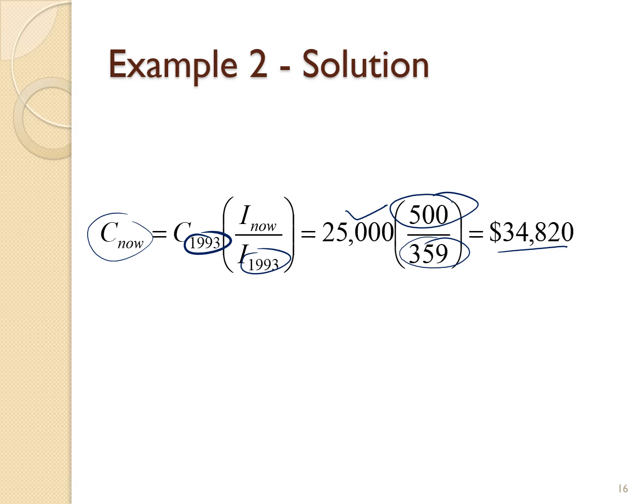But for approach 3, you may use any of the 3 indexes available. It depends on you. If the index graph provided is only until 2005, you need to do the extrapolation in order to know the current index.